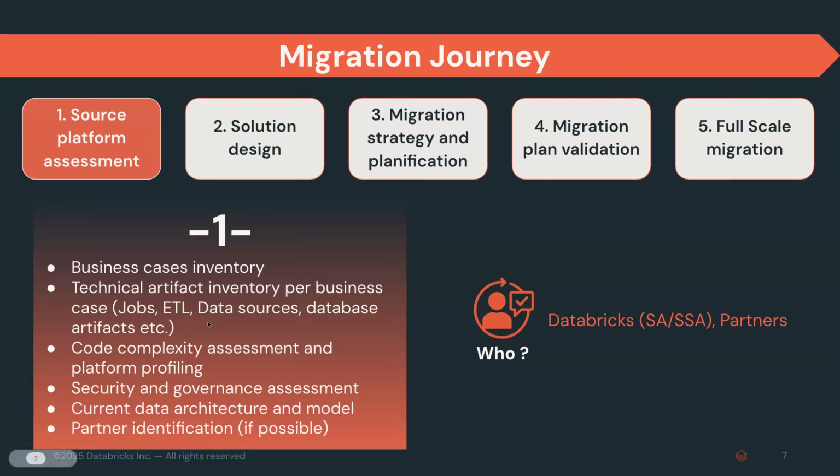Further on, with Lakebridge Analyzer, we are able to dive a little bit more in terms of the volume metrics. In other words, what stands behind the complexity of your current data estate? How many ETLs? What are their real t-shirt sizes, right? Or low, medium, high complexity? What are the SQL assets you have, SSIS packages, and so on and so forth? Why does this help? This helps with staying data-driven from the very, very first phases and not making the wrong assumptions, but using the data to justify exactly this timeline, team composition, and the migration delivery approach. Let's move next to the solution design.